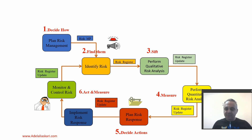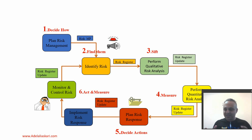Consider a real, large-scale project. On one side, you have a long list of activities that may include hundreds or thousands of activities. On the other side, you have a long list of identified risks that may affect more than one activity. By combining these two lists, you create a matrix that includes hundreds or thousands of different scenarios — a very complex situation that cannot be analyzed by our minds or on a piece of paper. Then we must enlist the help of software to do quantitative analysis on the risk scenarios.